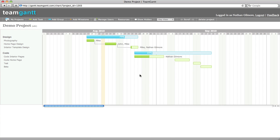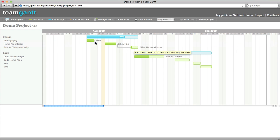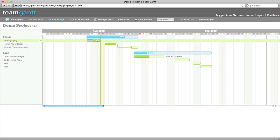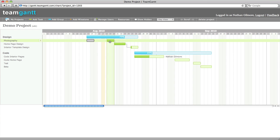Another great feature of Team Gantt is dependencies. Dependencies are indicated by the gray bars connecting the tasks. This is great because if you need to reschedule your tasks, you can move tasks together as a group.